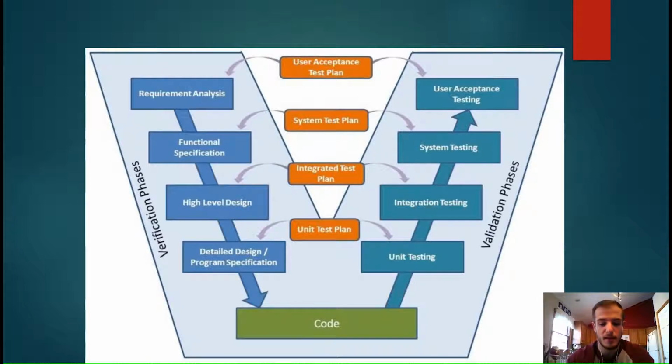So with high-level design, the high-level design consists of specifications being designed. Modules are being broken down into details such as brief descriptions, interface relationships, dependencies, databases, tables, diagrams, and details of the technology that are going into the system. And the integration testing takes everything that is explained in the high-level design, everything that's specified, and it tests to make sure all the modules and everything about them are compatible with each other. So those two work together very well because it just recycles all the information that is gained from the high-level design and is incorporated into the integration testing.